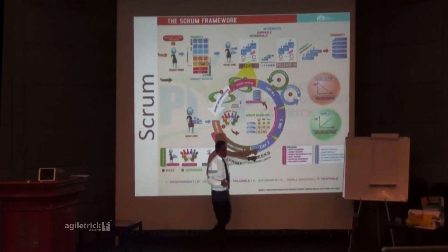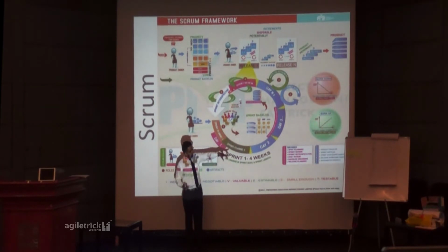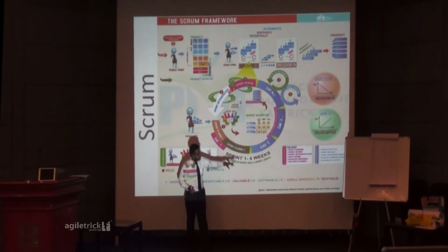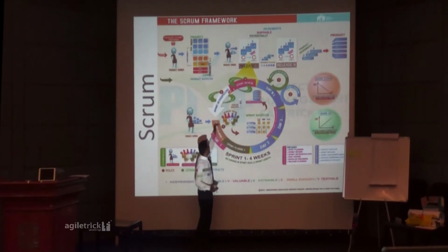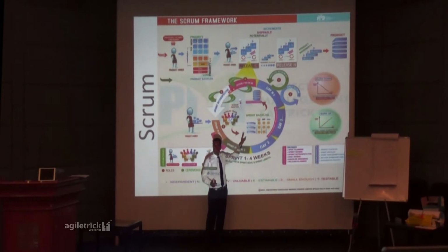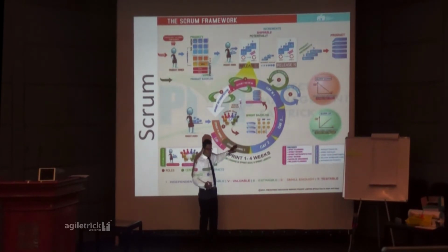Once the team understands the top 5, 6, 7 user stories, they cumulatively work out the total capacity of the sprint, a 2-week sprint. Under current conditions, I know before starting sprint planning meeting 1 that I have around 366 hours. When they break the first story into tasks, they identify it will take 100 hours, cumulative development, UI and all.